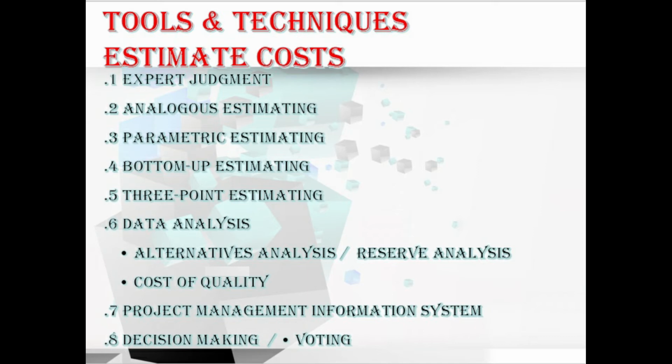Okay, moving to the next estimating technique, parametric estimating. This estimating uses a statistical relationship between relevant historical data and other variables to calculate a cost estimate for the project work. The variables include, for example, square footage in a construction project. This technique provides a high level of accuracy depending on the underlying data built into the model.